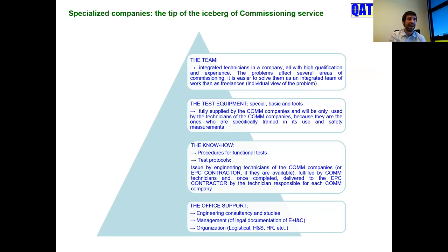It's very important to have a company for the commissioning who has an engineering consultancy online. Online means always available to solve any problem of the commissioning. I say that because the engineering department of the EPC is not always involved in the development of the project, because it has a lot of projects. For instance, when the CSP Khi plant in South Africa is about to be finalized, the engineering department of Abengoa in this case is focused on the Guadalsamal project.